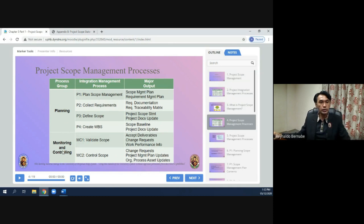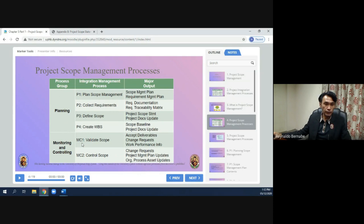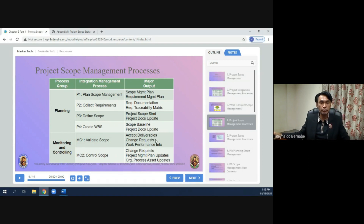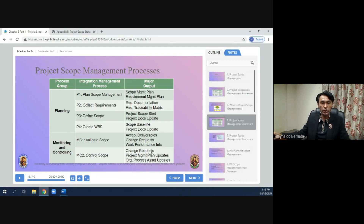Under monitoring and controlling, we have two phases. Phase one is validate scope, and the output is accepted deliverables, change requests, and work performance info. Phase two is control scope, and the output is change requests, project management plan updates, and organizational process asset updates.